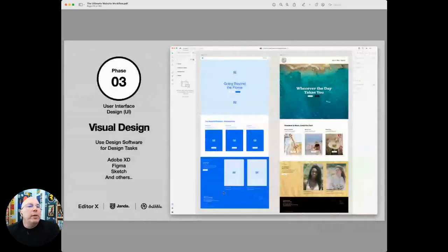Okay, so this is the example. You wireframe using that wireframe kit, or you make wireframes of the template that you are going to build from, or you wireframe the custom modules that you're going to do for a completely custom site. Doesn't matter what your process is, you have to do the wireframe, and then you design the visual design on top of the wireframe, and then you build that.